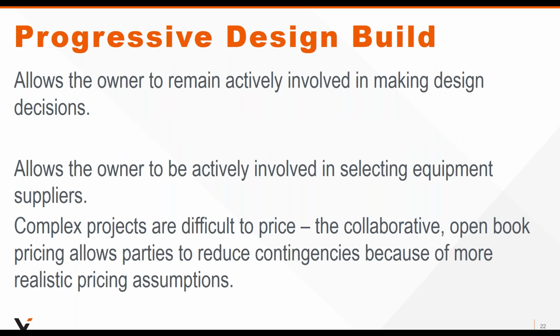So the owner's involved. Oftentimes, especially with complex processes like water treatment plants or wastewater treatment plants, the owner has the ability to select the equipment suppliers that they prefer or that they have experience with, and they can direct that. And they can actually go ahead and place those orders for those long lead items. And because they are difficult to price, it's collaborative. The thinking is it's open book. And so there's less need for contingencies because there are more realistic pricing assumptions built into the planning phase.